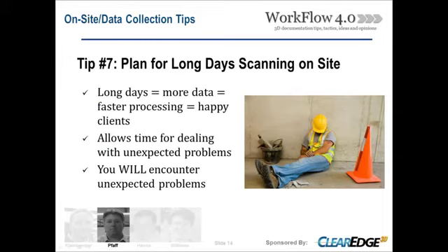As far as our experience, typically, if you are on site longer, it reduces a lot of moving equipment around, setup time, access time, especially in the evenings. A lot of these projects we end up doing are evening sites. The longer you can be on site, the more profitable you'll end up being, especially with travel time.